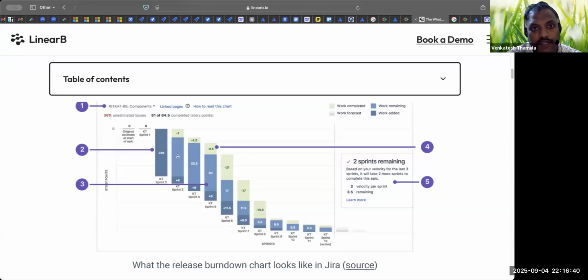Out of that payment feature, in sprint 2, we created 6 or 7 stories and added them. Then we again created 1 story here, 2 stories here, then 3 stories here. We keep adding till this point, and then we say we don't want to add, because if we add anything now, we will not have time to do it.